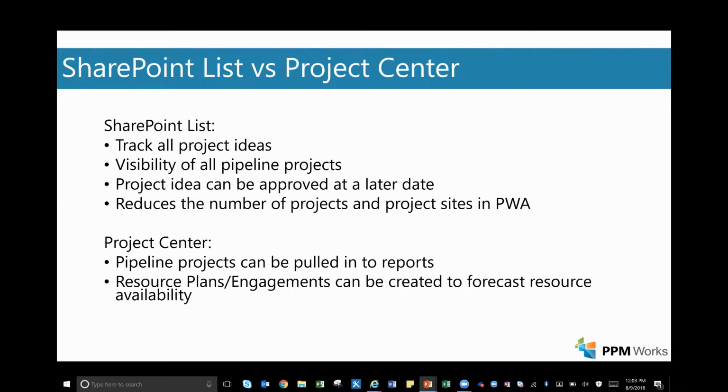So understand that in the idea list, you're not doing any scheduling, you're not doing any kind of resource demand or forecasting. At most, you would say we expect this project to take 3 years or 7,000 person hours. You know, your estimating would be at a very high level. Again, just looking to vet the ideas and see whether or not we should truly consider them to become projects in the Project Center.